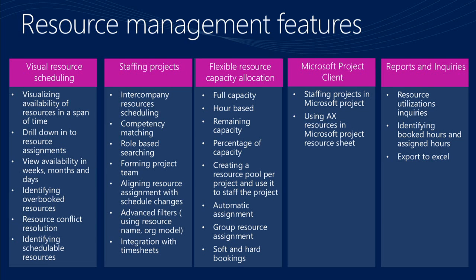The second area where we again made quite a lot of investment was intercompany resource scheduling. It doesn't really matter where the resource is hired or which LE has the resource hired. What matters is that when we need resources, we can reach out to those resources from across the organization, from other LEs, as long as they have entered this intercompany relationship. You can choose the workers, you will see the right sales prices for them, and you can book them on projects.